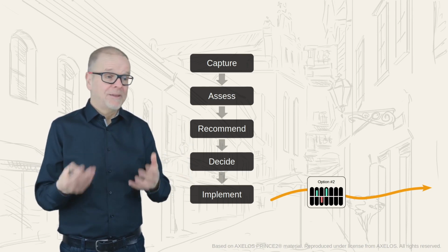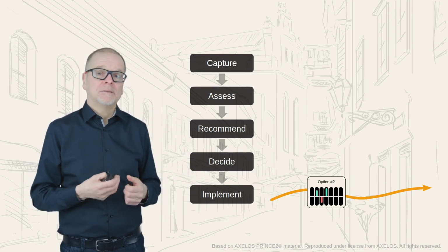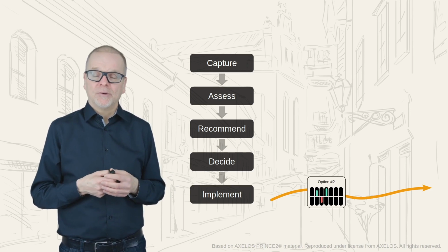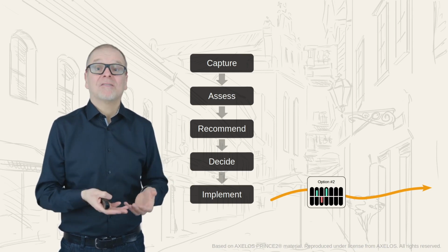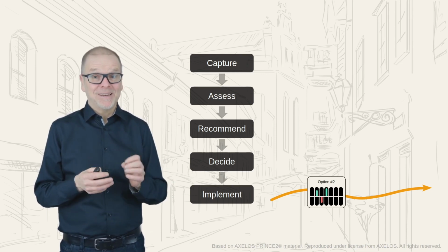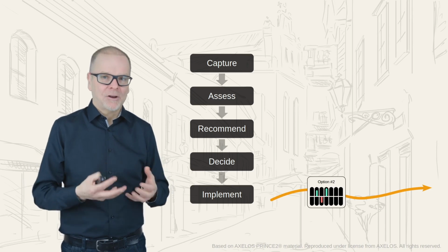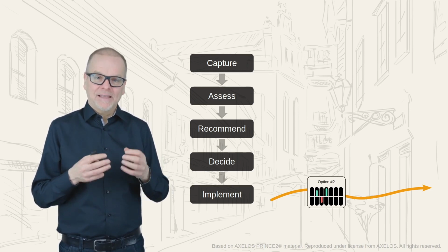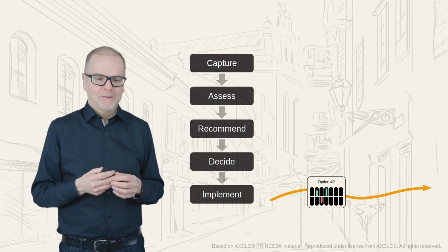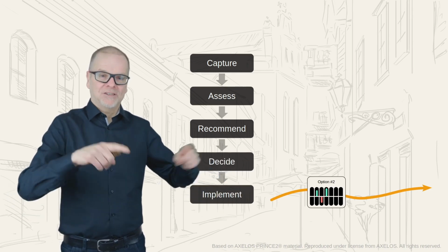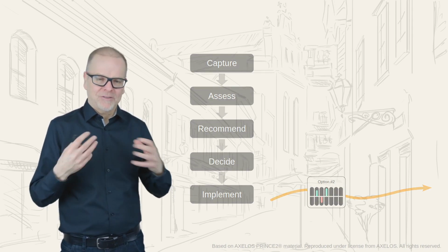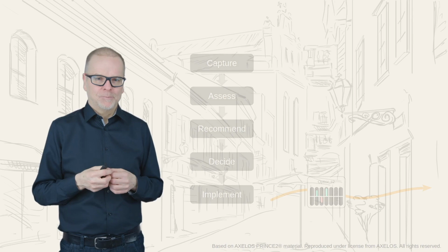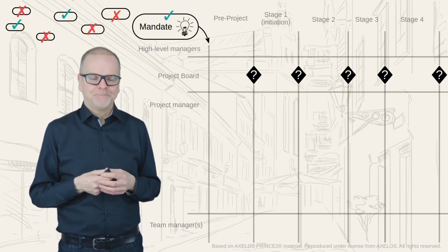And then the output of that meeting can go into a report document, and we can call this the issue report. Now, sometimes project managers think they have to present a solution, which is not good. This is a really common mistake, especially for more technically oriented project managers. They think they have to be the smartest person in the room. That's not a good idea. We should use the knowledge in the room and facilitate it. So the project manager should just facilitate, ask the right questions, and then get input from everybody. We can come up with a lot better ways of finding a way forward if we do that.